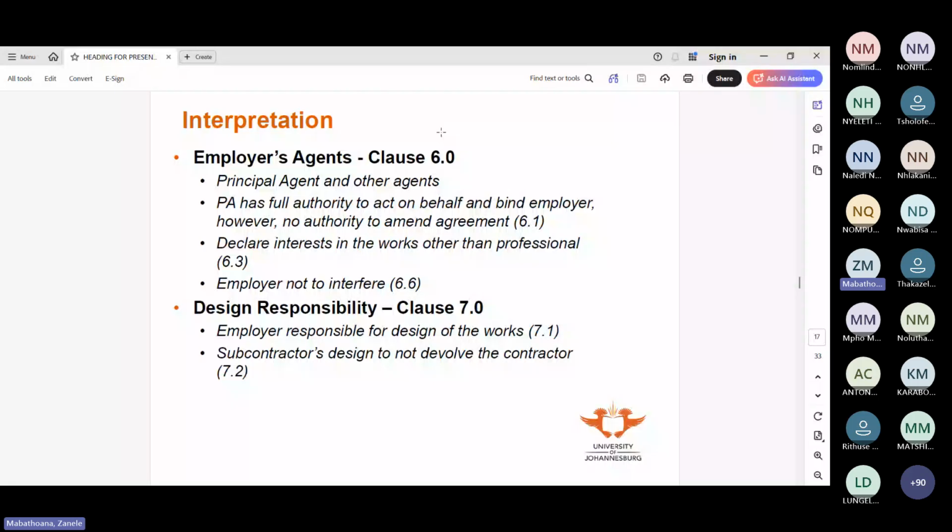So the contractor took the old lady to court to say, but this was your house. And like I say, it's an old case. I'll just ask one of my former classmates and then find it, and then you can read it, because I don't even remember the merits. It was so faded on that document. Hopefully somebody has retyped it. But in the end, the contractor lost the case. So this was money he had put into the contract, and he couldn't get paid. The court said, you can't hold this poor lady responsible for that money. She was not there. She didn't agree to it.